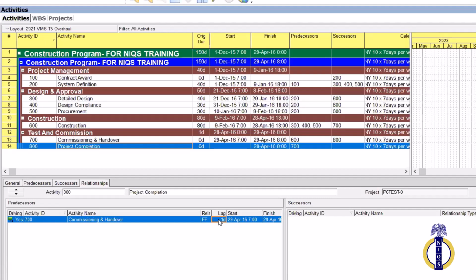So instead, find a way to break down that activity. That's why I say keep it simple. Don't make your schedule complicated. Find a way to make sure that it follows the flow, the natural sequence. Just like when you have water flowing through its course, flowing through a drain that has a steep slope. That's how your schedule should be built. So don't complicate it with negative lag. Positive lag is fine, but negative lag is not welcome. And you shouldn't use so much of it.